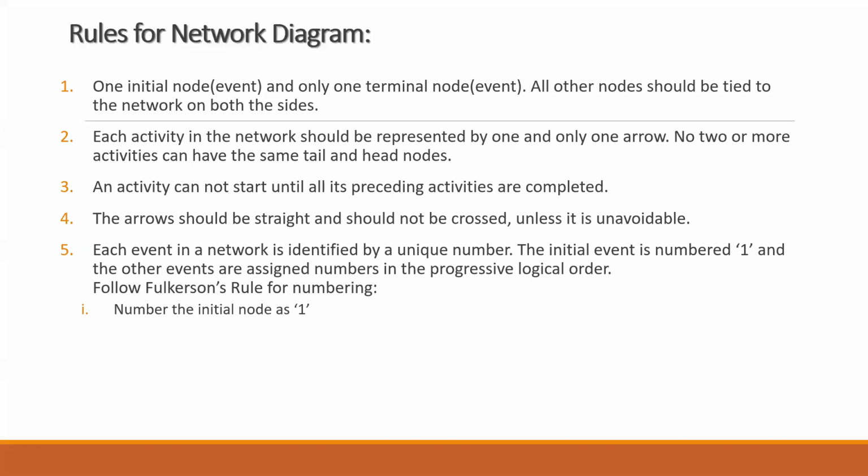Very simple rule. Second one, delete. You can say hide, not delete. When we say delete, you need not clear it out. You have to just imagine that it is deleted. So delete the outgoing arrows starting from this numbered node. That is the second step. And number the nodes which now do not have any incoming arrows.